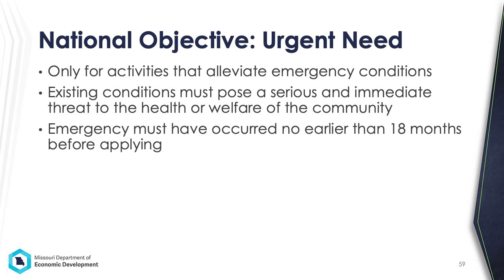Next is the urgent need national objective. This is only for activities that alleviate emergency conditions. The existing conditions must pose a serious and immediate threat to the health or welfare of the community, and the emergency must have occurred no earlier than 18 months before applying. Under this national objective, you'll be asked to document the nature of the emergency in the application.